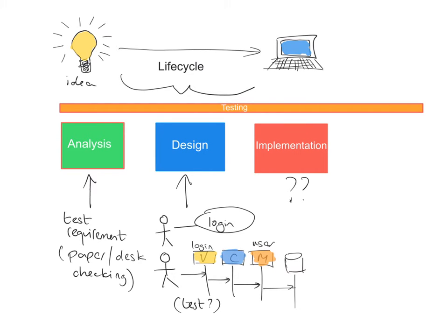Now, some of the reasons for starting implementation is you want to often eliminate risks, and risks to a project are often that you don't understand the framework that you're going to use, or the documentation is quite poor, or there's something that your requirements have that you really need to solve and sort out. I need to know, for example, if I had an iOS application, that I can consume this web service and take this JSON data and display it onto a table, and you may want to prove that's a possible thing before you move on, and I think that's okay.